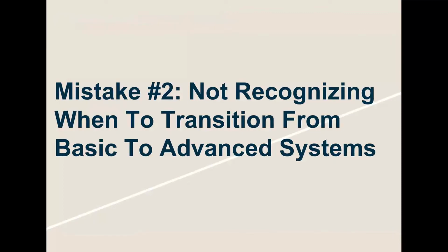Right, and the SOP document, once you do a first cut, is a living and breathing document. As you move more and more into the details and nitty gritty of the project, that SOP document gets updated. So it's a constant feedback loop on the SOP document.